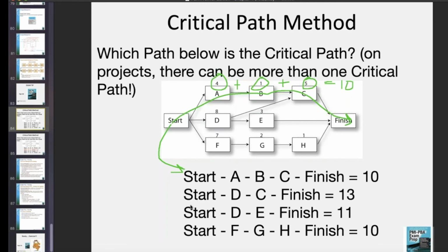All you need to remember is this. The critical path, there are 4 paths here, is the highest one, the highest number. And that's the duration of the project. So if you have 112 days, then 97, 95, 92 for 4 different paths on the project, how long is your project? 112 days. Critical path is the project duration. That's all you need to know for this exam. So the critical path is the longest one.